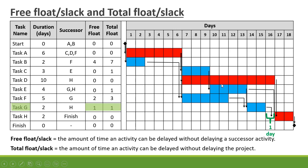Task G has a free float of 1 day as well as a total float of 1 day. Task H has 0 free float and 0 total float.